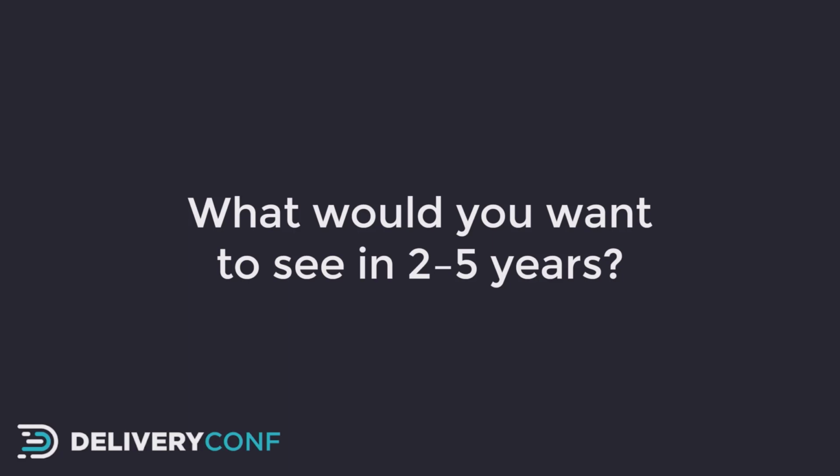Yeah, and you said make your life suck less. So we say find what hurts the most. Where's your biggest pain point? Improve that in this sprint in some way. Then in the next sprint, is that still your biggest pain point? Do you still need to work on that some more? Then you get that piece working, and it's like, okay, what's our next biggest pain point? Work on that. And it's a journey, right?